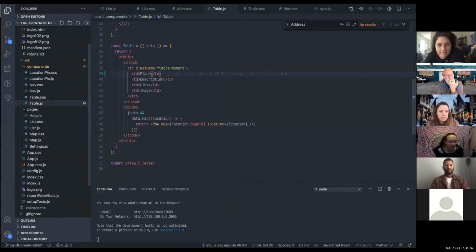Small stories. We talked about waterfall versus these things, right? We talked about waterfall a little bit. One of the big problems with waterfall is that you have a requirements gathering phase at the beginning of the project, and people think, this is my chance to get all the things in so that they actually get addressed in the project. What tends to happen is this kitchen sink effect where people try to think of everything they could possibly want, and then that becomes a requirement, and then the project takes a year and a half, and everyone's like, why did we do that thing in the first place? It's not even useful, right?